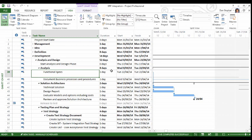And of course the business process is to be defined at each organization, but typically what would happen is a project manager would go and raise a risk or issue on the program level site and then assign that risk or issue to the program manager for them to reassess and then manage it from there. And so that makes quite a nice way of differentiating between the project level risks and issues and those that affect the whole program. Are there any other questions there, Chantal? No, that's all at this stage, but keep them coming. If anyone else has any other questions, feel free to pop them in the question box.